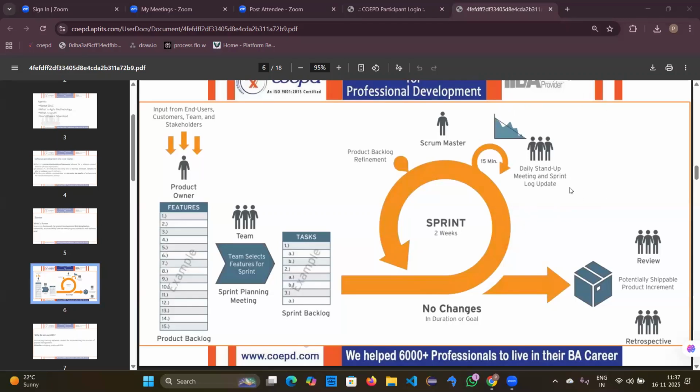Every day in the 2 weeks it will usually be 15 minutes. In these 15 minutes, they discuss what they have done today and what they are going to do tomorrow. If they are facing any challenges while developing, they will discuss these challenges in the daily stand-up meetings.